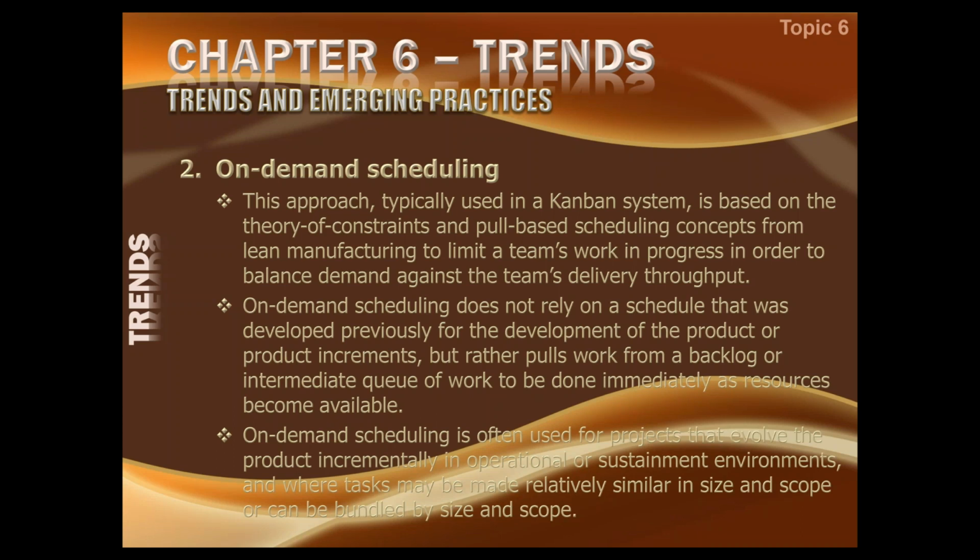If we have picked 10 items to work on in this sprint, and we start doing all the 10 items simultaneously, then we will not be able to accomplish any one of them in time. So let us reduce the work in progress. Do not increase the work in progress. Limit it. Limit the work in progress. According to your capacity, take 2 or 3 jobs at a time, whatever is your capacity, and first finish them and then pull new work into it. Don't try to do everything at the same time, because that will be more inefficient.